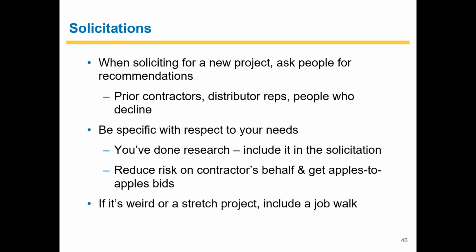A couple slides I'm going to try and get through here. Solicitations: generally speaking, convey everything you know about the project in the solicitation. That helps make sure you're getting apples to apples bids between the contractors. And if you're doing anything that is weird or unique, do a job walk. That job walk is going to level the playing field quite a bit, and in doing so, make it easier for you to get those apples to apples comparisons.